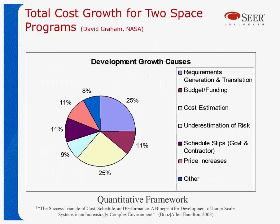From NASA, David Graham showed the reasons for cost growth in two space programs. Looking at the yellow piece, that was actually cost estimation issues — 25%. Other things included: requirements changed, budget and funding changed, they underestimated the risk, there were schedule slips on both the government and contractor side, and there were price increases. So estimation itself was 25% of the problem in their analysis — 75% was other things.